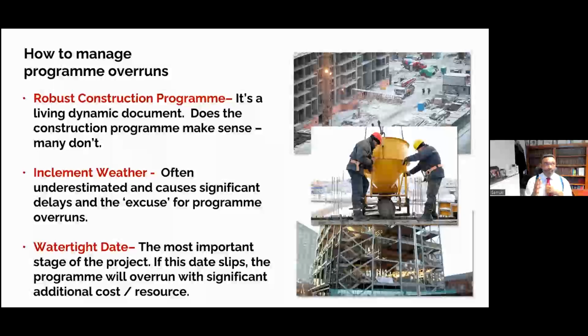And for architects particularly, when you look at a contractor's construction program, think that the program is aimed at you, because you are required to provide the working drawings in sufficient time for the various activities to be procured and therefore be able to be delivered on site. So if you look at a program, ask yourself, in fact, most very well-versed architects will turn around.